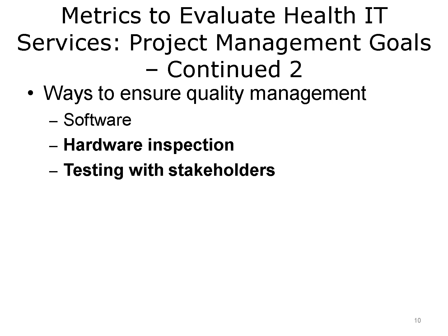Meetings with stakeholders can be invaluable in rating the perceived level of quality of a project. Any stakeholder who believes that quality is suffering should be taken seriously. The concerns should be documented and managed as a risk to the project's success until the customer or stakeholder is satisfied. Managing this risk would be accomplished by including stakeholders in the early testing of the new mobile workstations.